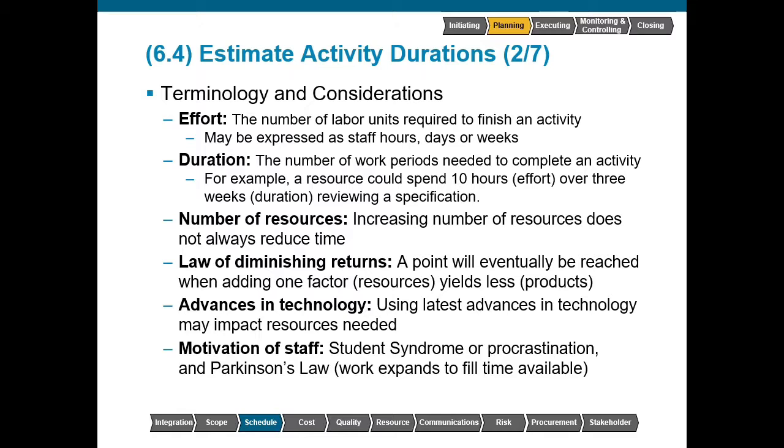Student syndrome refers to a planned procrastination. It's where we understand that there is a deadline. If I know that I have 8 hours worth of work and I have a 40-hour week in which to do it, student syndrome says I should wait until the very last day and do all 8 hours of work at that point. This causes unnecessary stress and a hurried approach that could have an impact on quality.